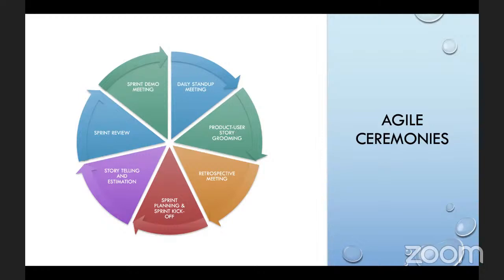They will talk about what they did the previous day, what they're going to be doing today, and number three, whether there are any impediments or blockers for them, anything that is hindering or impeding their progress, right? So again, write this down, guys. Three things in the daily stand-up meeting. Number one, they will share with the team.